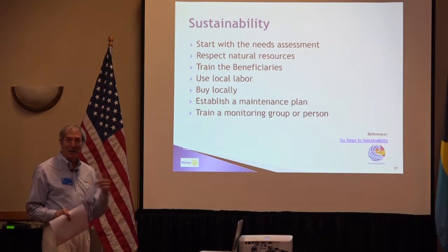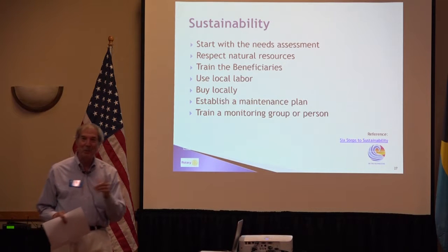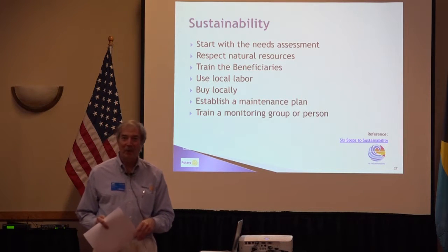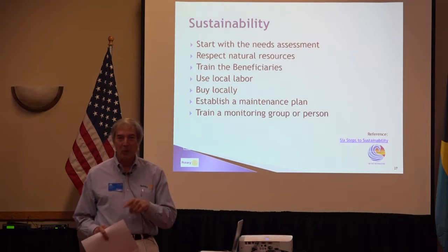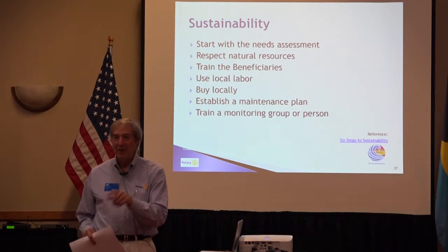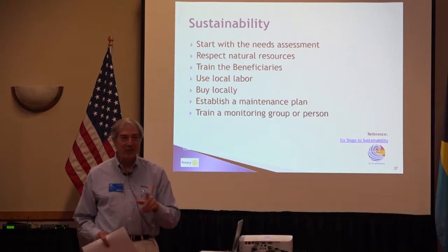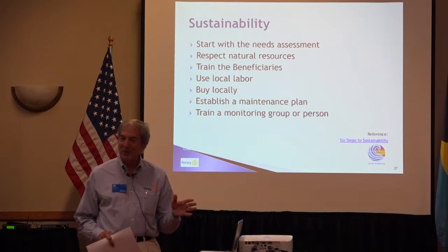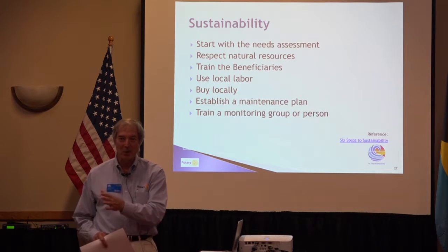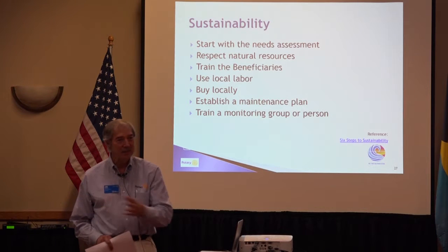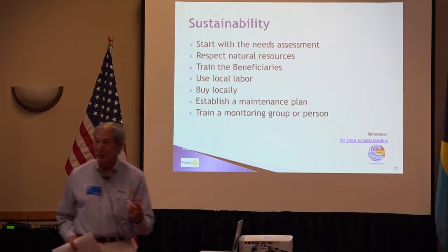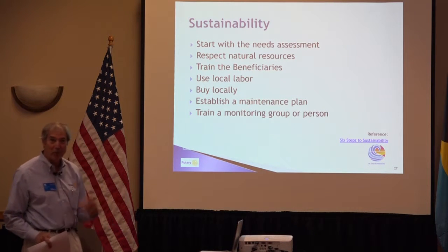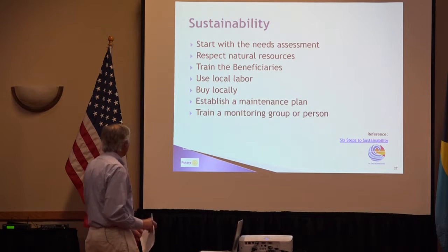We found out after half a dozen projects in Haiti building latrines, that the more you use local people to train other people, the better the training goes. And so no matter what it is, if you've got people who are learning stuff, use them to teach other people, use as much as you can. It works so much better because everybody gets invested in it and the training will be much better appreciated than if we do it ourselves.